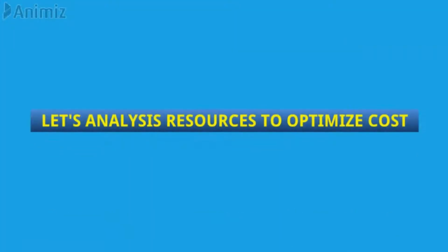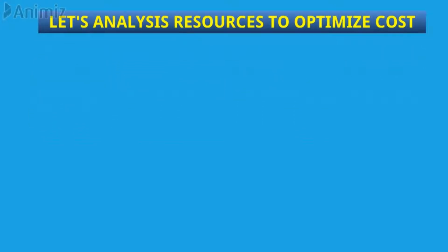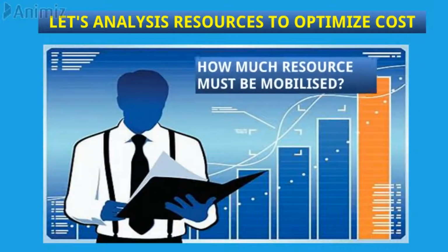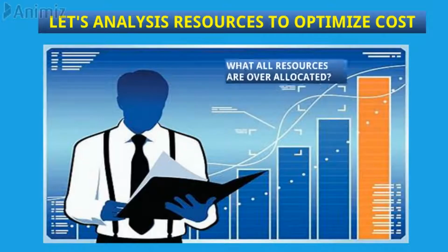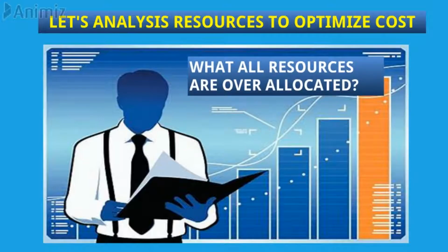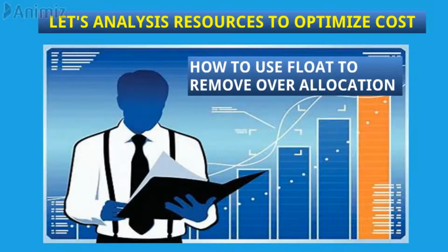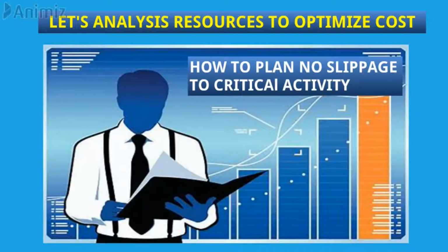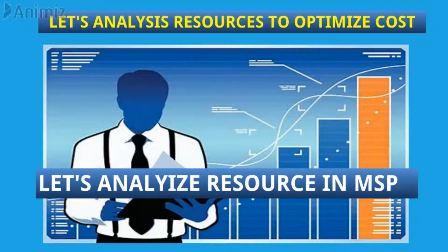Till now we have prepared the resource loaded program. It's now time to analyze resources to optimize cost by answering a few questions. The first one, how much resource must be mobilized? What all resources are overly allocated in our schedule? How to use float to remove the overallocation of the resources? How to plan no slippage to the critical activity? Let's answer all these questions with resource analysis.